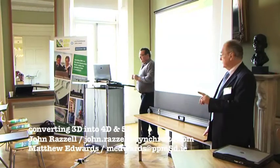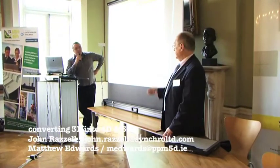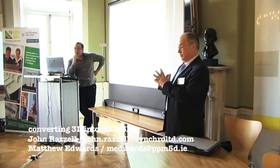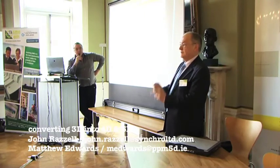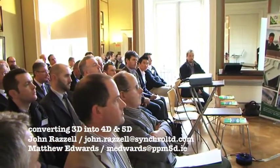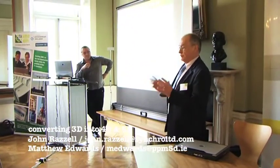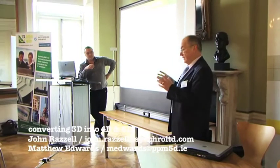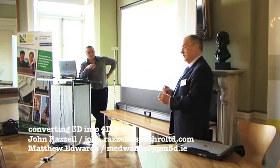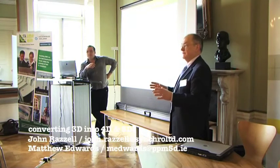Yeah, that's the point though. If you're using Primavera and you want to synchronize, it either has to be on the machine or on a network that it can link to with an API to get proper synchronization. If you change the Synchro program, or change anything here, and you want to synchronize it with the Primavera master model, you have to have it either on your machine or on a network drive which you have a link to via an API, so it connects up.